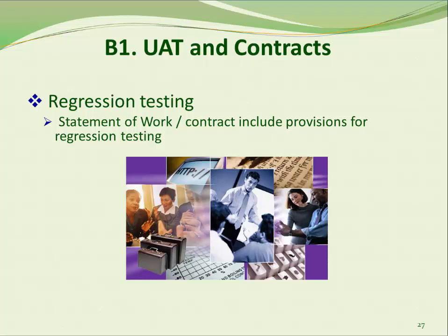A common method of regression testing includes rerunning previously run tests and checking whether defects that were fixed have reemerged. FNS may require any or all of these tests to be repeated in instances where significant modifications are made to the system after these tests are initially completed, or if problems that surface during initial testing warrant a retest.